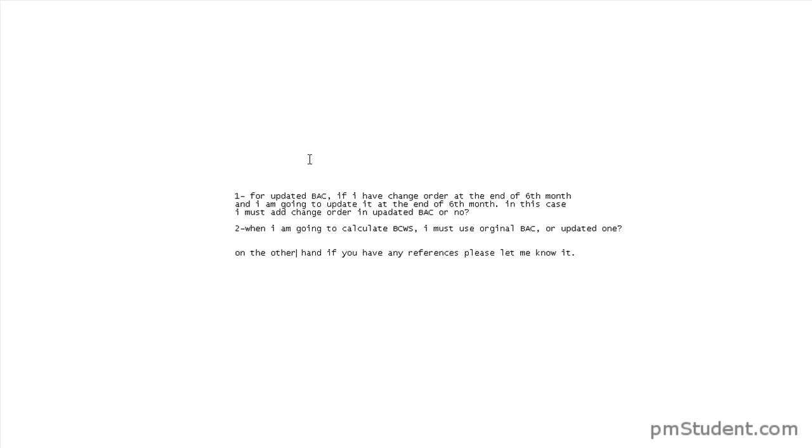Okay. The second question, when I'm going to calculate BCWS, which is budgeted cost of work scheduled, must I use the original BAC or the updated one? With both of these questions, first of all, I'm assuming that the change is actually making a substantial impact on the cost of the project. If it's going to be a minor one, it's not something where I would actually rebaseline and recalculate the BAC if it's a minor change.